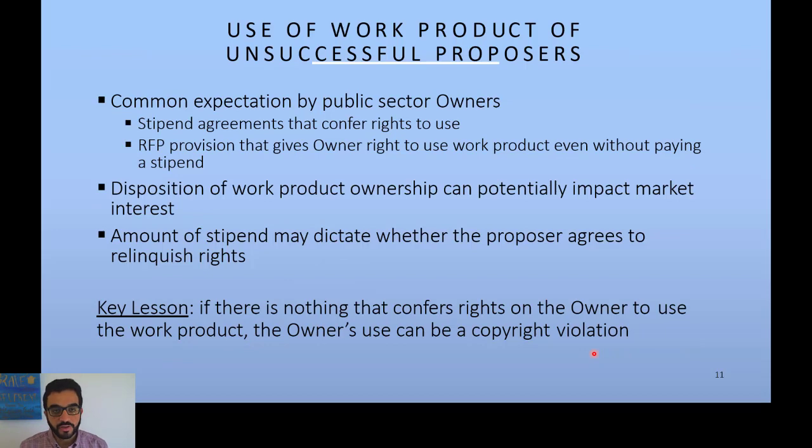The last liability issue with design build procurement is the use of products of unsuccessful proposers. The common expectation here by public sector owners is that a stipend agreement will result in the rights being passed to them in using the products of unsuccessful bidders. And that's in the public area.